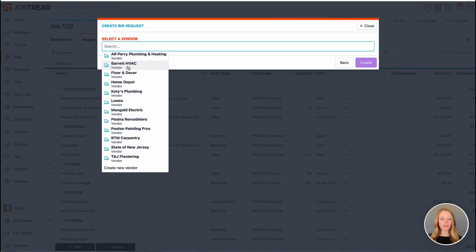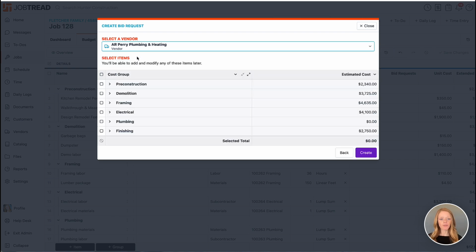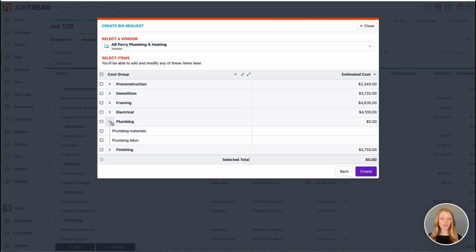So I need a plumbing vendor. Here it is, A.R. Perry, perfect. And then I'll select which items from my budget I want to include on this bid request. So I can choose one of my plumbing items or my entire plumbing group here, and then hit create.